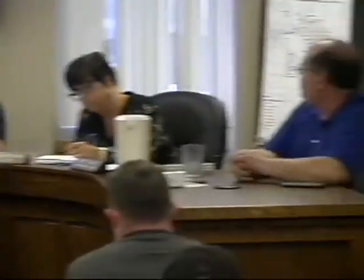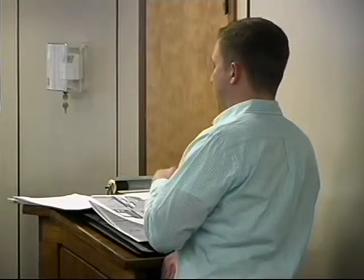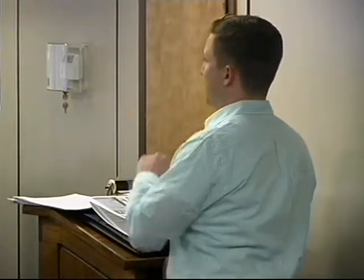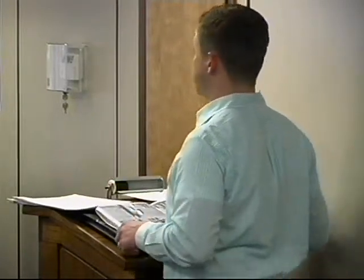And this was a big enough section, it is just a patch going back in, but it was a big enough section. We could've used the patch price, but it was a big enough patch that we got an actual decrease in the patch price. So it was well worth going and getting the number from Bob, because it's a bigger patch, it's easier for them to do, so it was good.